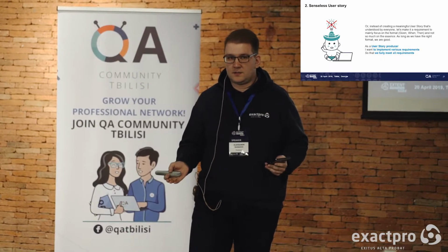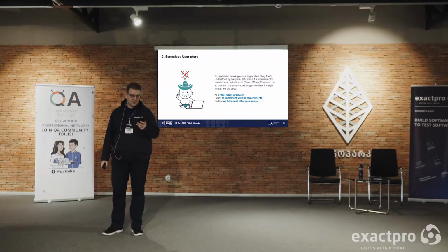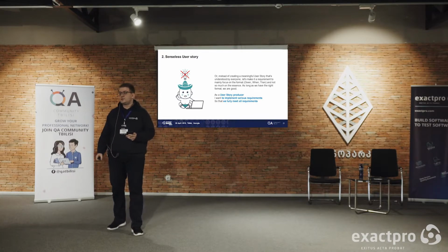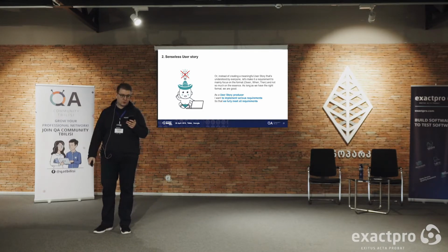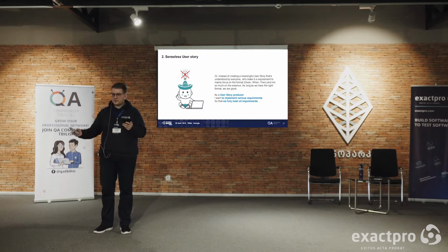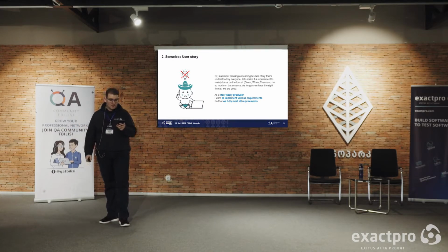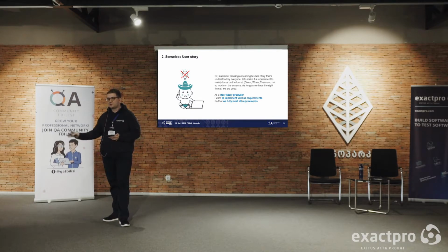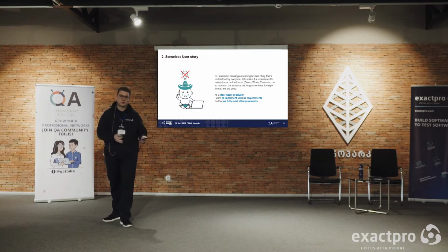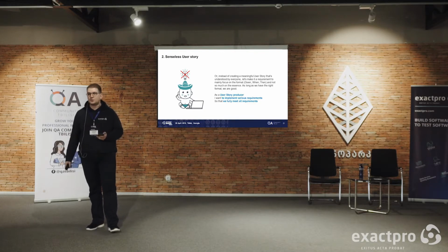If you are impersonating such a thing as a regulated exchange or some other unusual entities, you just don't understand what a user story is. A user story is something that is useful for a particular user. For an exchange, users are members, brokers who submit orders, and they can understand what they need from their exchange and check whether it works. Also, market control, internal teams inside of the exchange who can start, stop, operate, and monitor it. These are also users, but an exchange is not a user.